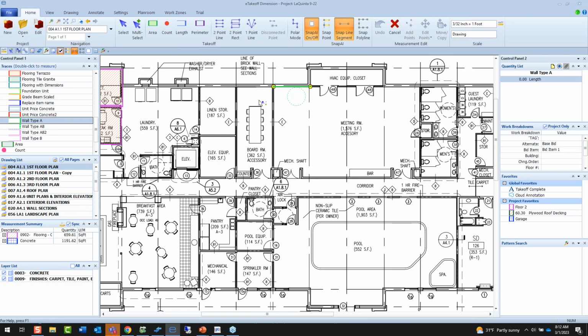I'm going to go through the process of taking off these walls here. And what you're seeing here is Snap AI technology, giving you the capability to snap to those vector lines. There's two types of PDFs. There's a raster, there's a vector. A raster is just basically digital ink on digital paper, but a vector has some underlying intelligence, geometry that we can take advantage of. So in this case, Snap technology gives me the opportunity to go through the process of snapping to those lines and then generating that length that I care about.